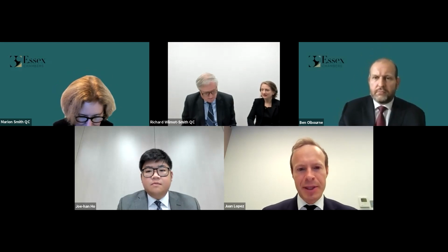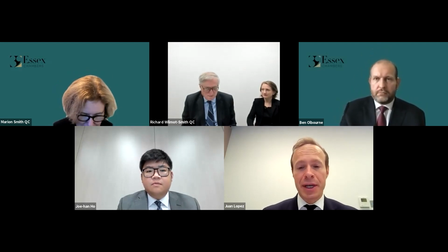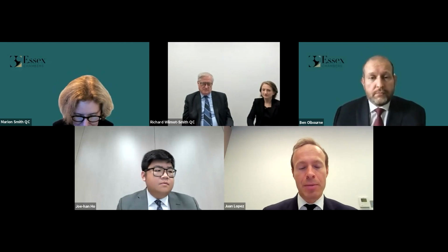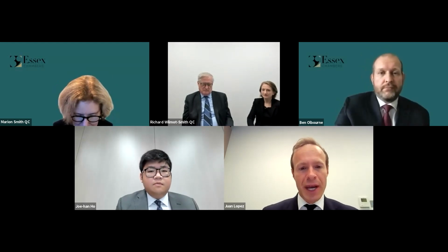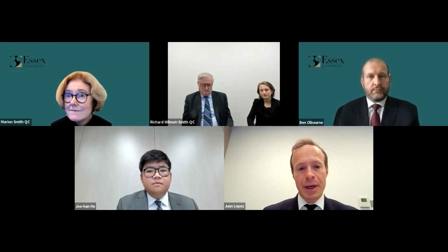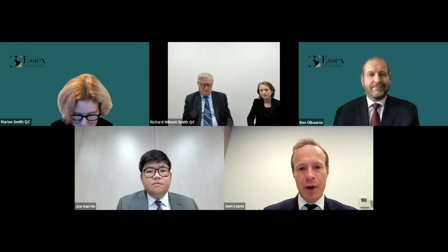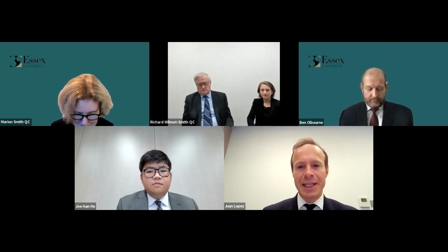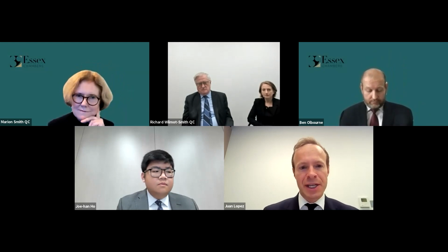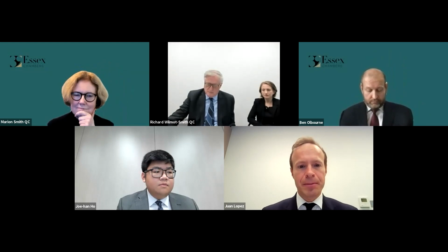First of all, he helpfully restated what we understand to be the Triton-McDessie principles in terms of interpreting damages clauses, accounting for a series of key fundamental components. I can deal with those at high level. First of all, the natural and ordinary meaning of the clause itself, whether or not in conjunction with other relevant contractual provisions, the overall purpose of the clause, seen within the context of the contract as a whole, the circumstances that are known to and assumed by the parties at the date of contracting, and then standing back from all of that and understanding whether or not the clause operates as contended in conjunction with what might objectively be seen as a commercial common sense approach.